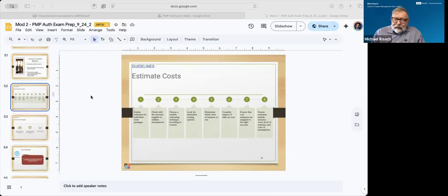So I didn't mention it, but the other side is where you're receiving the products. If you're heavily unionized, if you're doing a project someplace, you can't just receive goods in. You have to have proper journeymen or unionized people receive them in and check those goods. You could have trucks in a queue waiting to come in, and if the right people aren't there, you cannot bring those materials in. If you do and you go against the union, they shut your entire job down. So those types of stagings and making sure you're in good with your unions are really important.